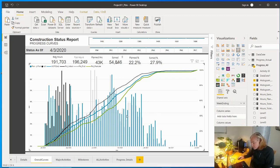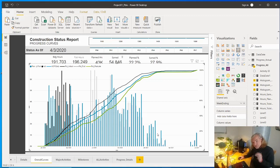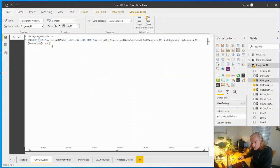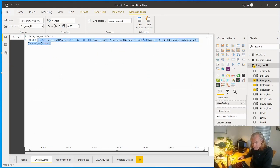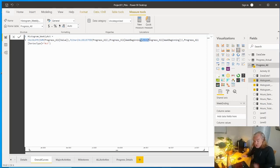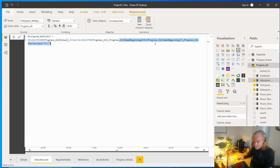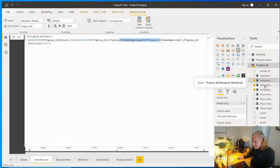Some other values, all our histogram values. Again, these are measures. All the histograms up here are a little bit more simple because we just want a sum of value for a current week. So now we're not doing a cumulative value, this is just for that week. What's the sum? Here we are, just sum actuals for a particular week and these are all done exactly the same way. That's the actual histogram.